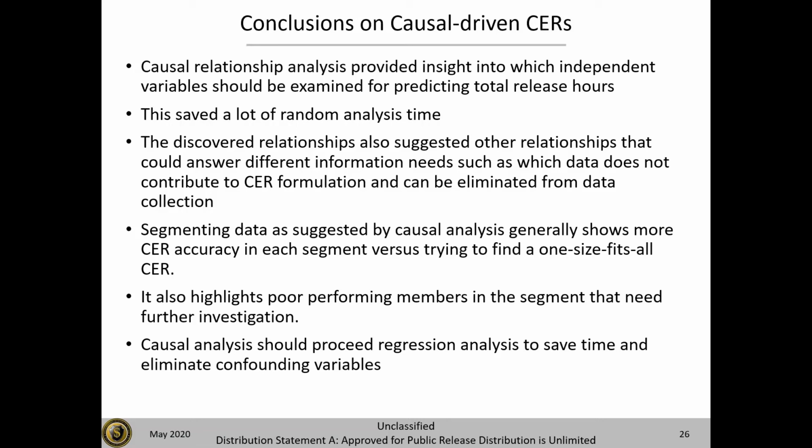In general, segmenting the data showed that was a good idea. The more we segmented into the ACAT levels and the application domains, the better the equations we got, rather than trying to do one-size-fits-all CERs. And that also highlighted some areas where the data was not very consistent. So we thought this was useful and provided some good data and helped us, and we definitely recommend it for folks that are considering analysis going forward.